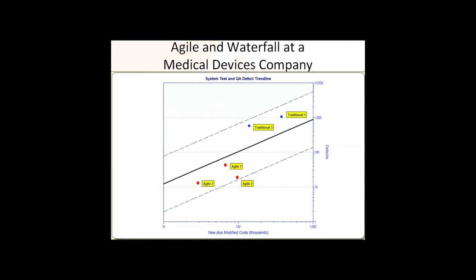They were very large projects over a year and a half. We compared the number of bugs found during testing against the QSM industry database. How to read this curve is that if you're above the line, you're finding more bugs in the code than the industry average. The upper hash line is the upper limit for the one standard deviation upper bound.